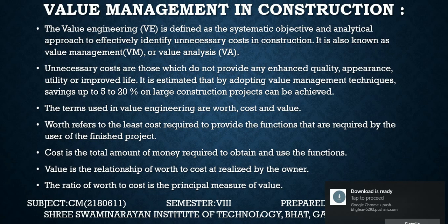Unnecessary costs क्या है, तो that is which do not provide, क्या प्रोवाइड नहीं करता है, तो वो enhance quality, appearance, utility, improve life, etc. It is estimated that by adopting value management techniques, saving up to 5 to 20% on large construction projects can be achieved. तो आप unnecessary cost को सेविंग अप टू 5 to 20%, जो भी लॉस वैल्यू इंजीनियरिंग की वजह से और वैल्यू मैनेजमेंट की वजह से होता है वो आप घटा सकते हो. The terms used in value engineering are worth, cost, and value.